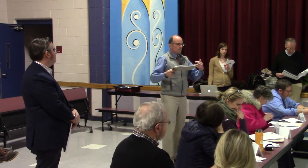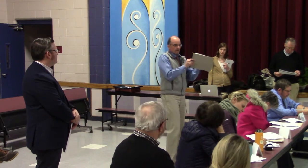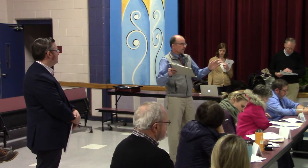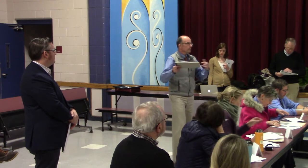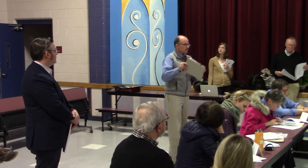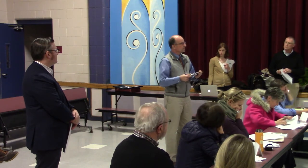And so what happens is when we're doing planning for a major renovation, the contingencies are higher. When a contingency is high, you get less built because you're waiting for those unforeseen things to happen. And they're everything from, well, we thought we were going to reuse these heaters, but they're too corroded, or when we cut into the pipes, the water was too hard, and now we have to replace all this pipe. There's a contingency for that, and that doesn't translate itself into a new building. It translates into paying a contractor to fix something that we didn't see.